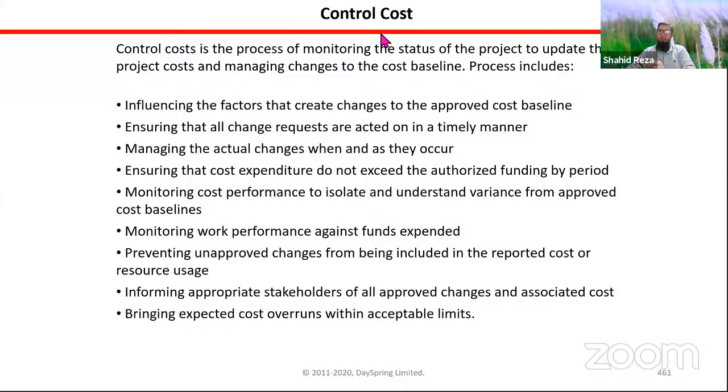If any change is required related to cost, say the budget you have planned is not working and the value of the material has increased, so you need more money, that should come through change management. After setting the baseline, if any change comes and has an impact on the cost baseline or any baseline, it must follow the change management process as per the PMBOK. Without following change management and performing the integrated change control process, you cannot make any change.